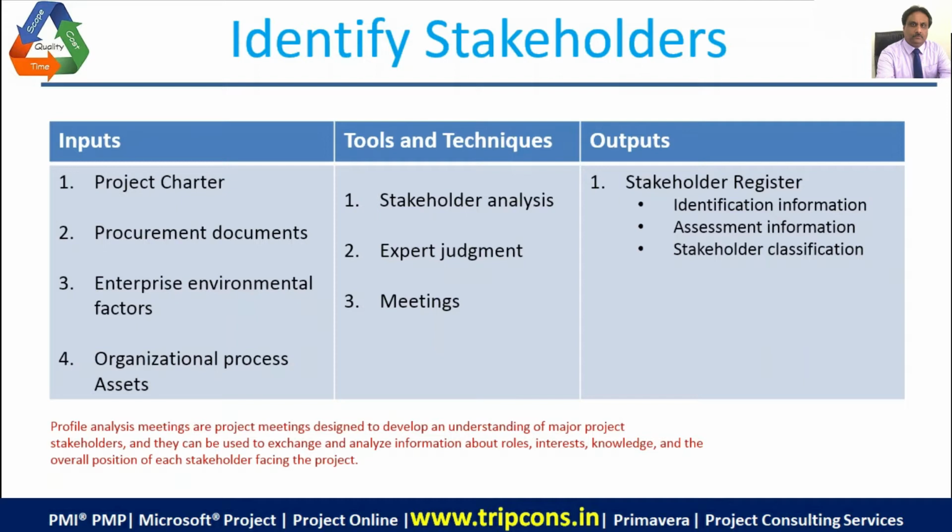We develop an understanding of the major project stakeholders, and exchange and analyze information about roles, interests, knowledge, and the overall position of each stakeholder facing the project. This is very important because we have to understand the dynamics of the stakeholders in the current project. Then identification information, assessment information, and stakeholder classification are done, and the stakeholder register is created.